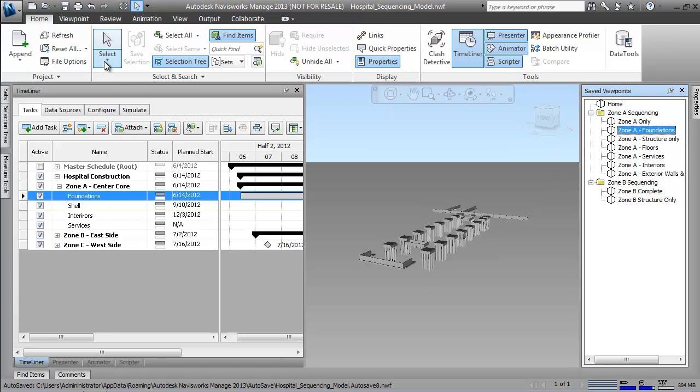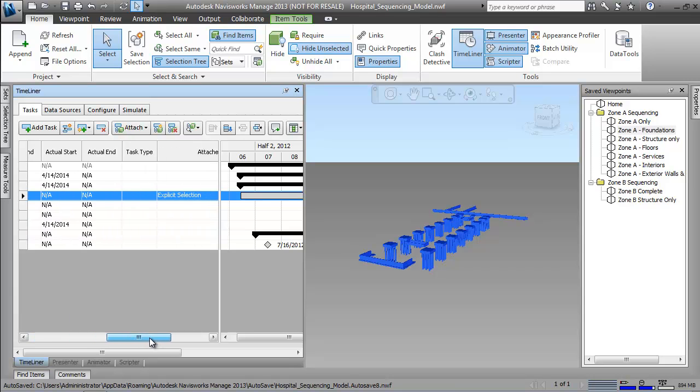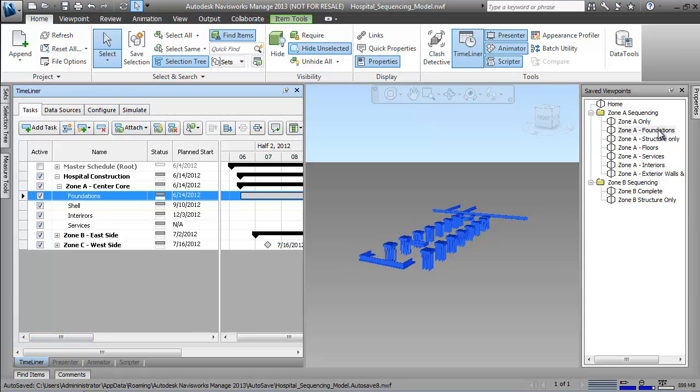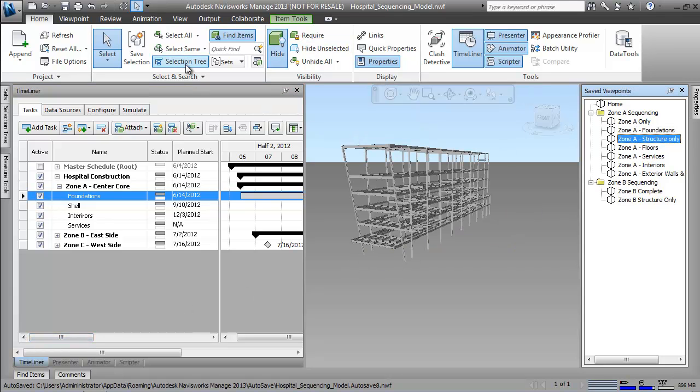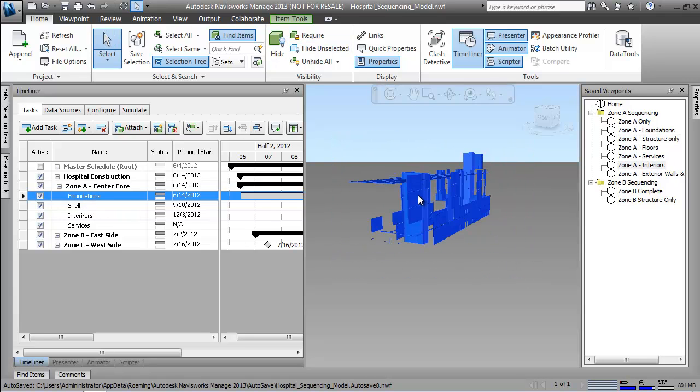The Autodesk Construction Solution supports workflows for creating project activities based on your categorization of the design data, which can be used to ensure the correct order of events, producing a skeleton schedule. With common tools such as indenting, moving, and grouping tasks right at your fingertips, creating a schedule here in the model environment saves time and streamlines the workflow. We can then easily attach model elements, even at the preliminary stage, quickly to the scheduled tasks.